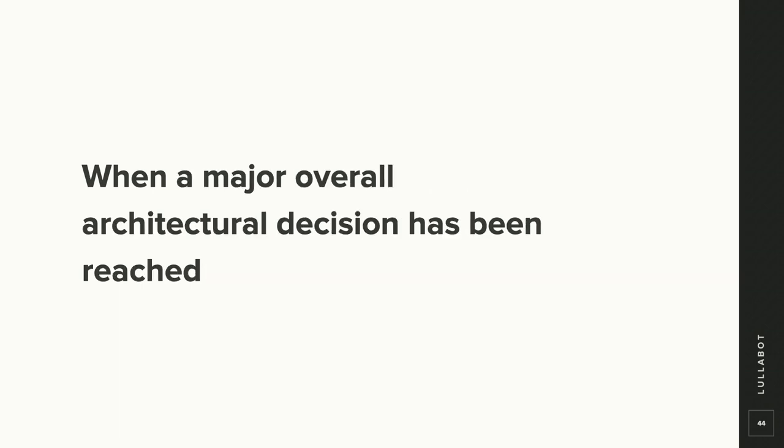As well, we think it's important to write ADRs when you have a major architectural decision. This is where all the PMs in the room, keep your ears open for these, because if your team is having after talks, or multiple after talks, or dedicated meetings to hash out your architectural technical direction on some part of your project, you're making decisions. And if you're not making decisions, then you should probably just cancel those meetings. But when you are, getting that down into an ADR is a really good way to prevent having to rehash those and say, hey, what did we decide again? Or why does this PR go in a different direction from what we decided? You have a URL, you have a reference, you can say, here's what we decided to do, let's keep going on it.